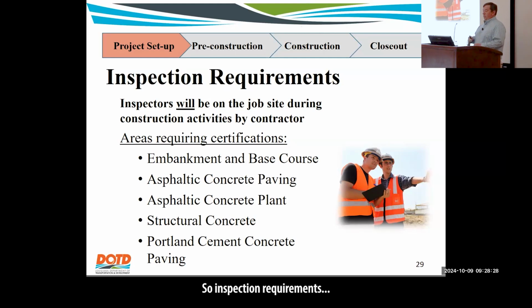So, inspection requirements. Inspectors have to be on the job site during construction activities by the contractor. If it's a pay item that they are working on, the inspector has to be there. They've got to make sure they are building that per the plans, per the specifications, that we're sampling and testing, doing all those things. So the inspector also needs to be certified.